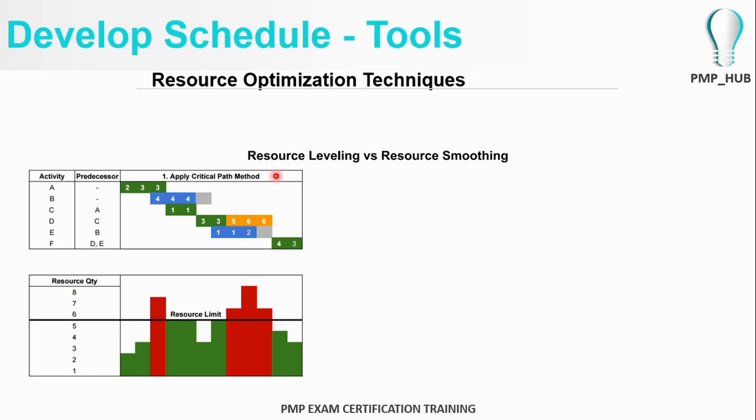Usually in this, we first perform the resource leveling and then perform resource smoothing. So let's perform resource leveling. Under resource leveling, for activity D, you have only 4 resources at any given time. So here during this period, we need 5 resources, 6 resources, and 6 resources. So this needs to be dropped to 4 resources. Total together is 23 man months.